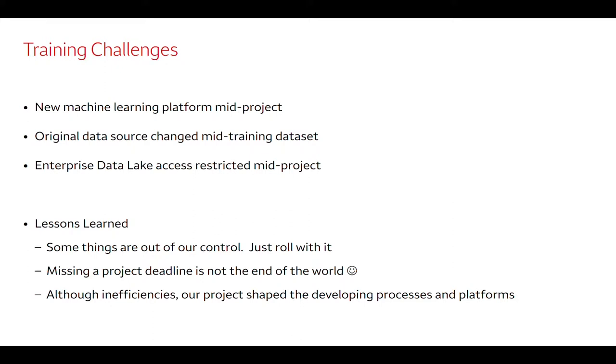So some of the training challenges we had, these are just things of working on a project at an organization. Things come up that you can't anticipate. For example, we had a new platform that we had to migrate to mid-project. Our data sources changed mid-training, so we had to map our data set from the one we were training on to the one we were scoring on. And then our access was restricted mid-project.